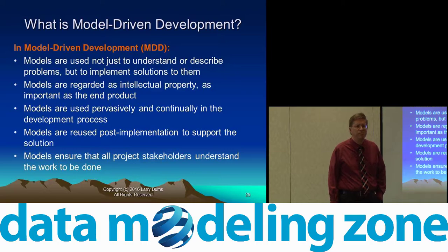So he spoke to the product owner. He said, "Look, I want to make a big bold call. I want to set aside the next 2 weeks, the next sprint, to get this data architecture, data modeling stuff sorted out." He actually measured the velocity before, multiple sprints before and multiple sprints after. The average increase in velocity was 12 times faster.